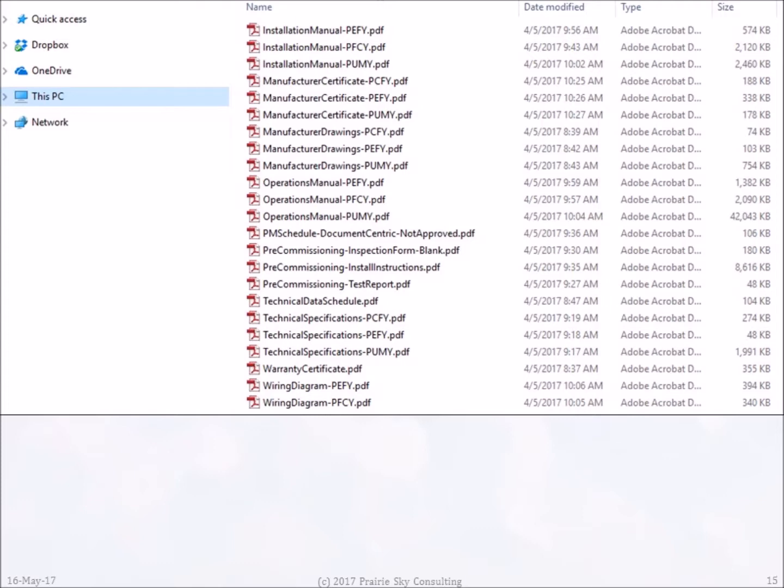It was based on one large PDF file. It was over 600 pages. It had lots of different content. I started by making one separate subdirectory for each COBie form so I wouldn't lose track of the files. When I split the large file into smaller files, I named each of the parts of the content by the product's model number. This system worked well for me, but you might find one that suits you better.